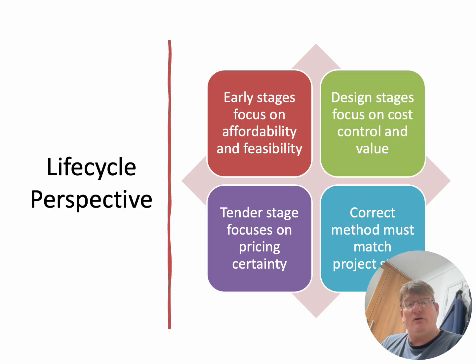Life cycle perspective. Early stages focus on, is it affordable? Is it feasible? Is the design feasible? Design stages focus on cost control and value. Okay, value for money. So early stages 0 to 1. Design stages 2, 3, and maybe even 4.